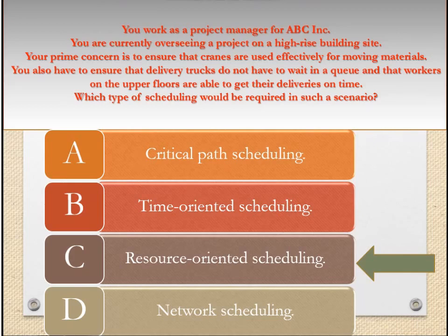Resource-oriented scheduling is also suitable in cases where unique resources are to be used, such as when there is only one excavator available in an excavation operation. Answered option B is incorrect.